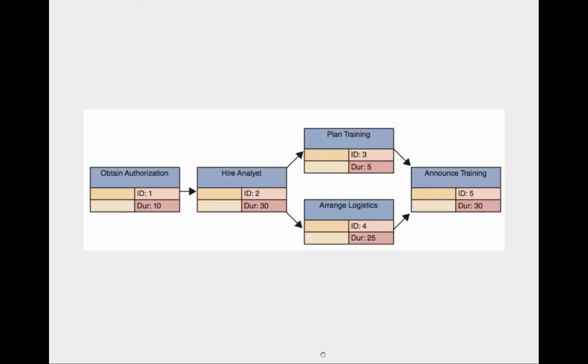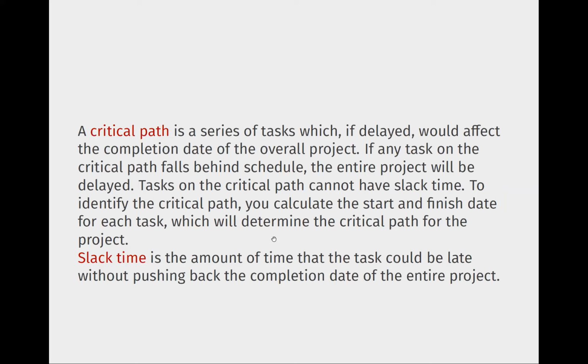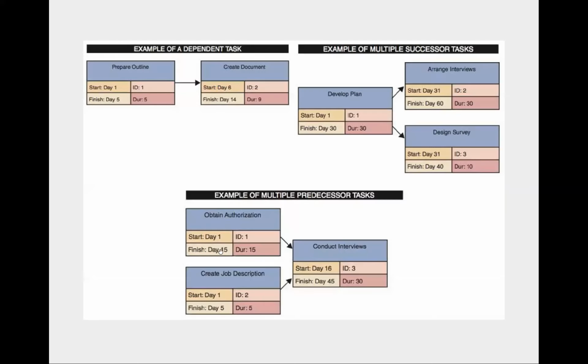Complete the start date and last date, like in the previous one. I will show you my previous one like this. So start and finish dates you need to figure out. If the duration is 5, you start with 1, then it's 5. When you start with 6, the duration is 9, the finish date is 14. You see how it goes. Okay, so let's do the exercise.